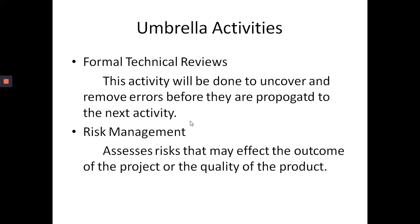The third umbrella activity is formal technical reviews. This activity is done to uncover and remove errors before they are propagated to the next activity. If the software engineer develops the project without checking errors in the first module, those errors will affect all subsequent modules. To avoid that, formal technical reviews are conducted where software engineers, managers, and customers review weekly activities, identify errors, rectify them, and only then move to the next activity.